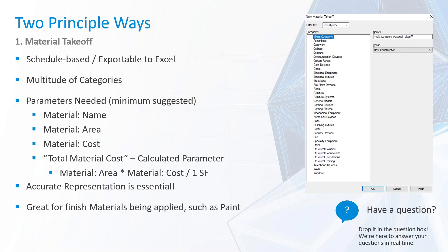One thing to be aware of with a material takeoff is that you really do need accurate representation within your model. Throw out those generic walls and default floors, and get in your two-by-fours or your metal studs with some gypsum. One of the great things this is actually really useful for is if you are applying materials as a paint in Revit — a true example being physical paint that you would be painting your walls with. If you need to understand how many gallons you are needing, this is a great way to look at that.